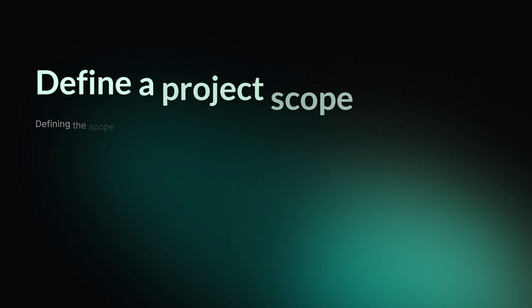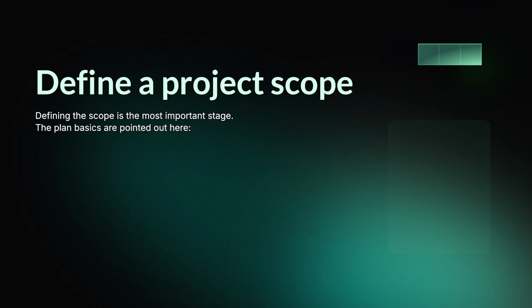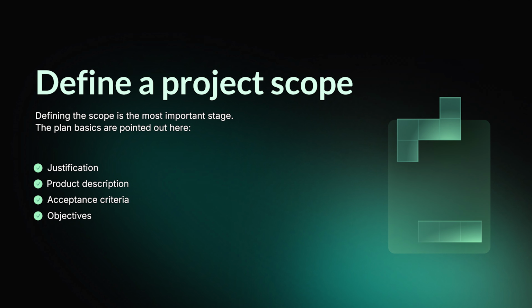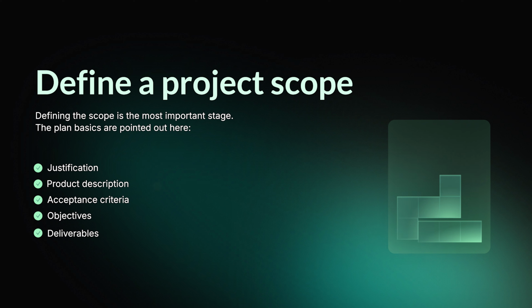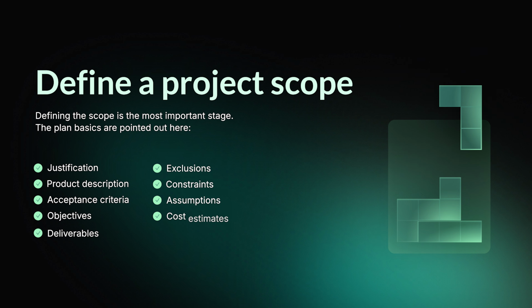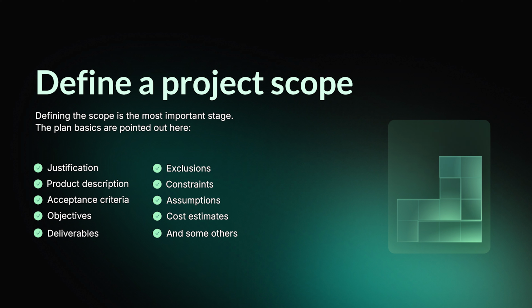Obviously, defining the scope is the most important stage. The plan basics are pointed out and discussed here. Justification, product description, acceptance criteria, objectives and deliverables, exclusions, constraints, assumptions, cost estimates, and some others.